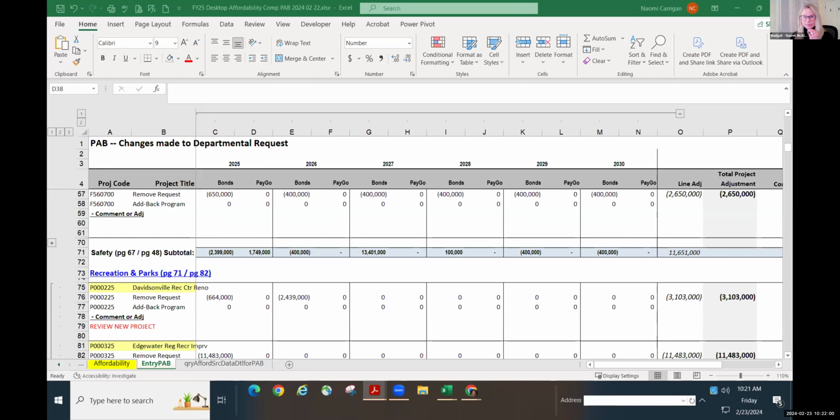Well, I would also add that the approach we've taken to this is that the building design itself won't change. It's basically a building that's being designed that will then fit on whichever site they choose. So we won't have to redo the design of the building, no matter which land. It's a square box with the pool in place. It will not be different.